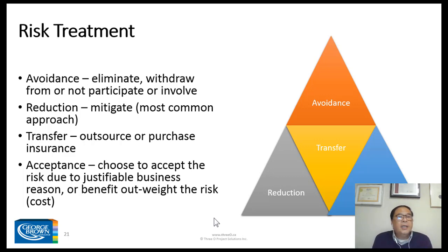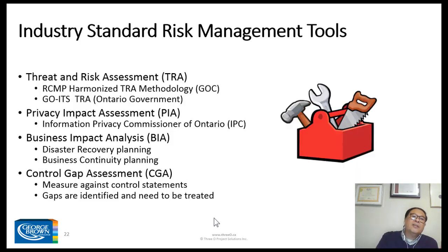You take the risk. Now again, based on the risk tolerance scale that we talked about, if there is anything like a 4 or 3, then it's understandable that we don't do anything about it. We just accept the risk. So these are the 4 very legitimate, very valid risk treatment methods.